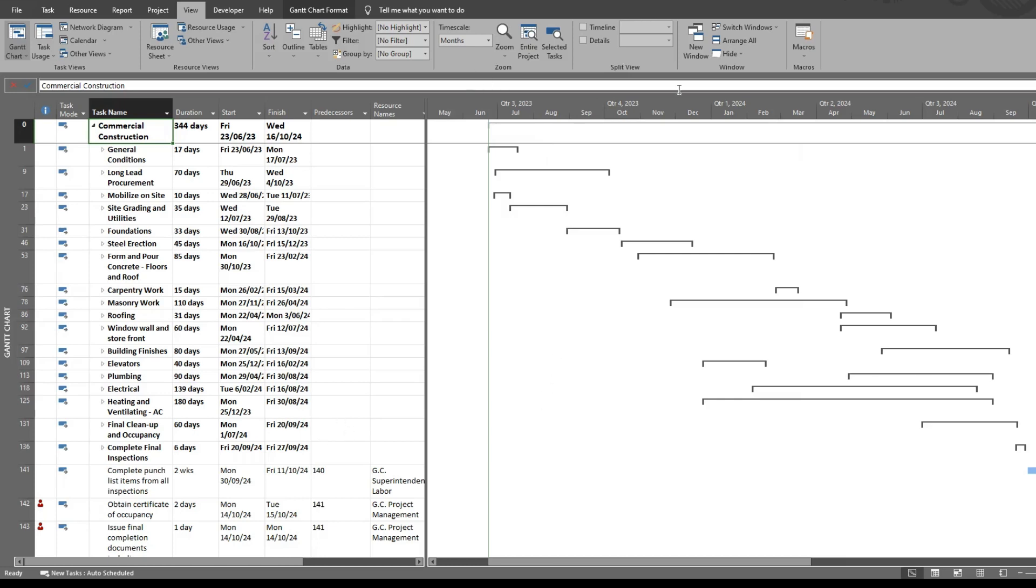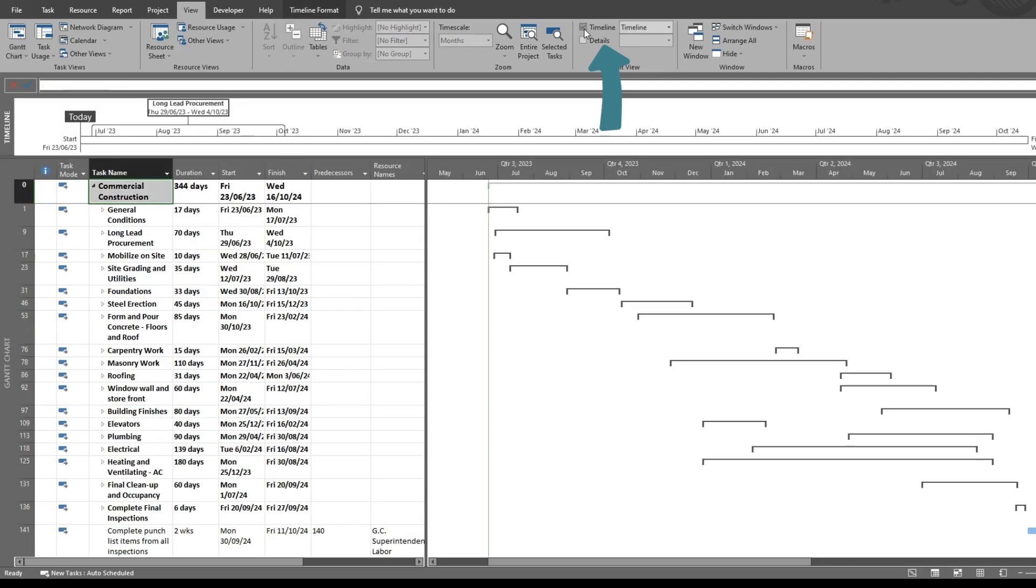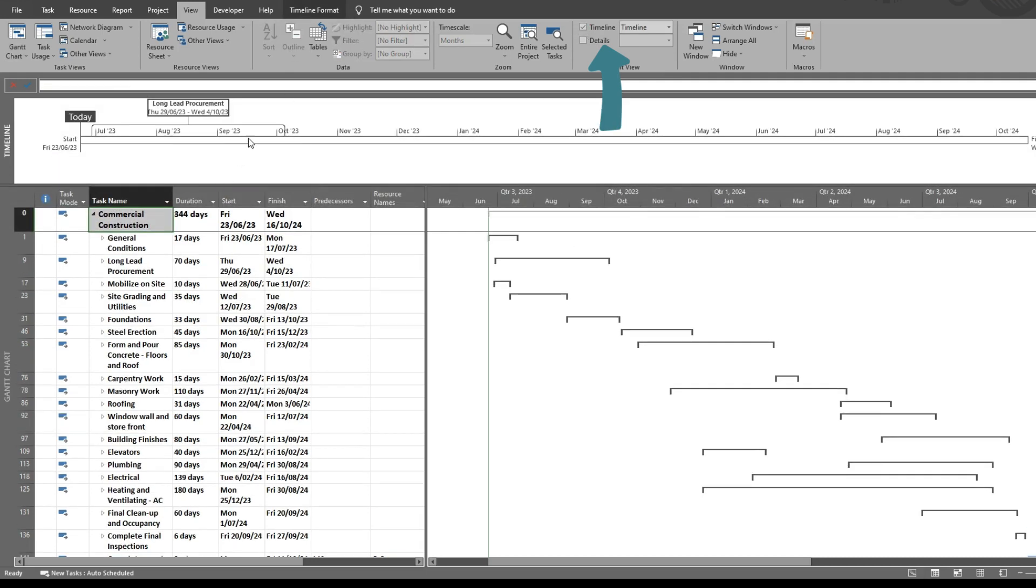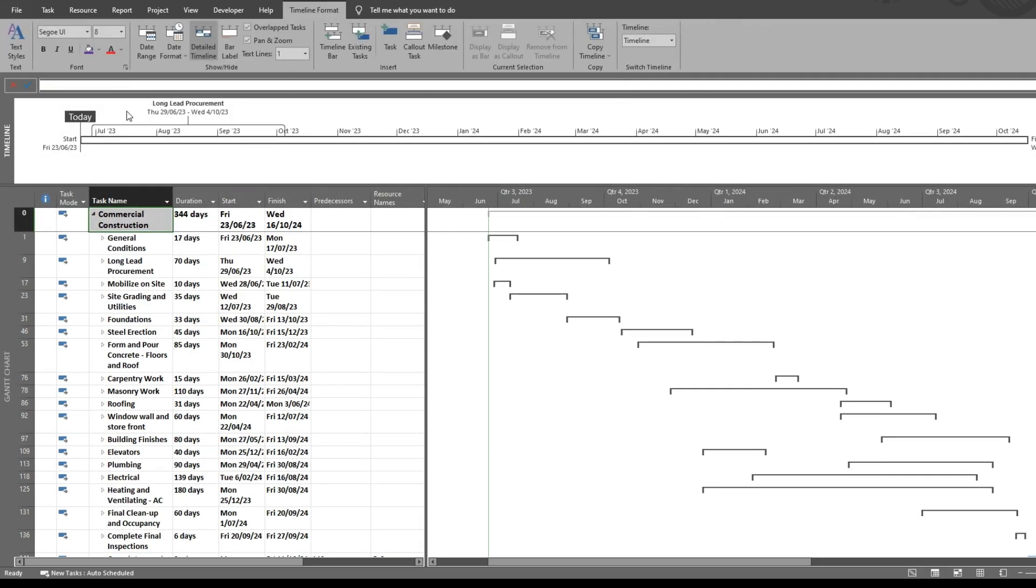You can easily create a timeline in MS Project by simply going to the view tab in the ribbon. You go to split view and you click timeline. Then you'll get a blank timeline that looks like this.